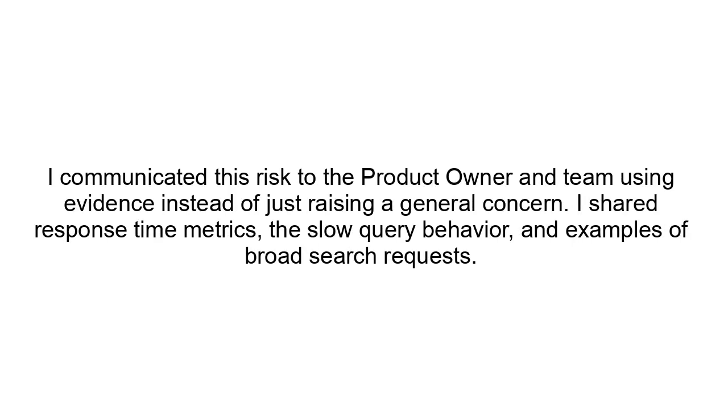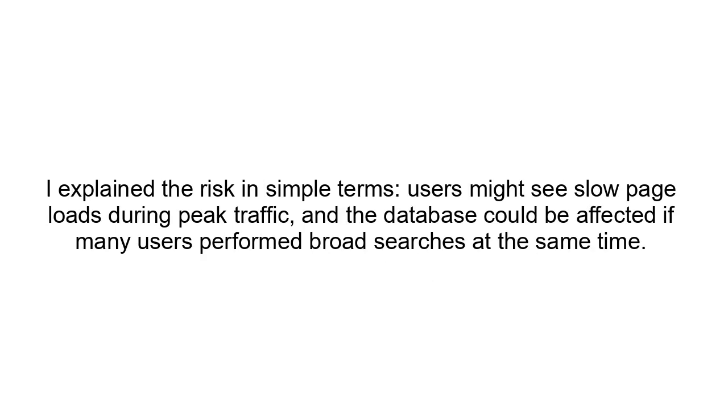I communicated this risk to the product owner and team using evidence instead of just raising a general concern. I shared response time metrics, the slow query behavior, and examples of broad search requests. I explained the risk in simple terms. Users might see slow page loads during peak traffic, and the database could be affected if many users performed broad searches at the same time.